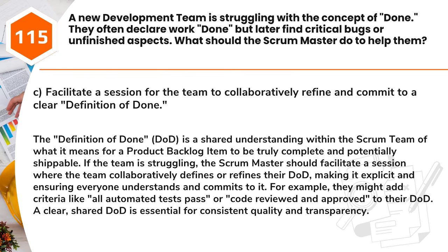DoD, making it explicit and ensuring everyone understands and commits to it. For example, they might add criteria like all automated tests pass or code reviewed and approved to their DoD. A clear, shared DoD is essential for consistent quality and transparency.